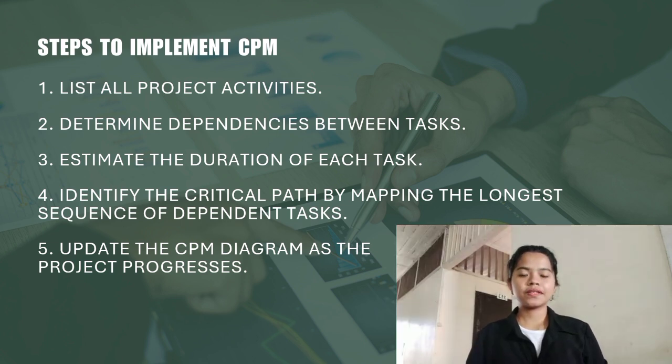The four steps are: first, we should list all the activities or tasks based on the problem. The second is to identify the given time duration and predecessor task. The third one is to determine the critical path, and last is to create the PERT CPM chart.